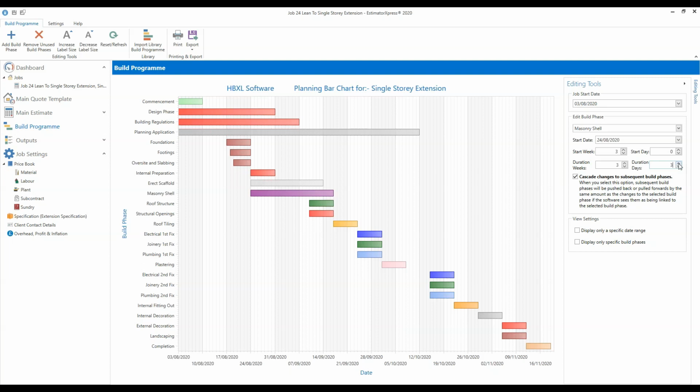If you realise that a particular phase is going to take longer, that the work is trickier, you will need to go and review that within the estimating calculator, or it might be a job specification level change that you need to make. So yeah, you need to apply your human judgment when you're setting up your build program, but it will not impact on the estimate itself.